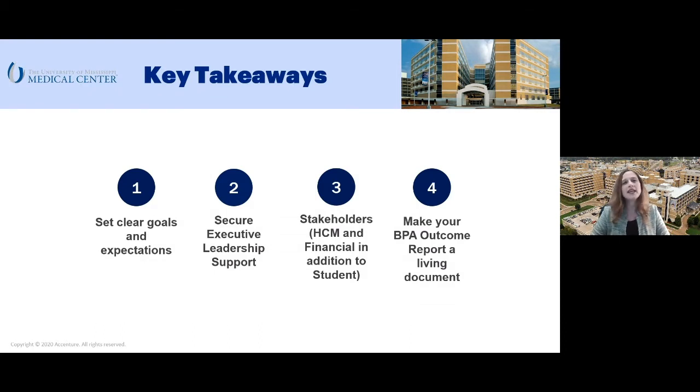I'd also recommend casting a very wide net when you identify your stakeholders for inclusion in these sessions. Just as important as it is to have the decision makers in the room, it's also important that you have the staff members there that really know how your processes work. One area where I will say we did miss the mark was we didn't include HCM and finance resources in our discussions nearly enough.